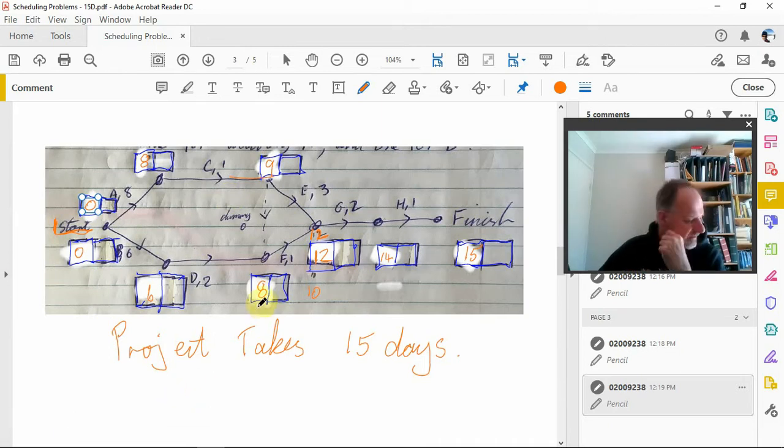Actually, I made a mistake there. I think that should be 9. That one, I have made a mistake. 6 plus 2 is 8, but F can't start until C's finished, and that's 9 around there. So that one there should be 9. I made an error on that one. Hopefully that doesn't confuse you.